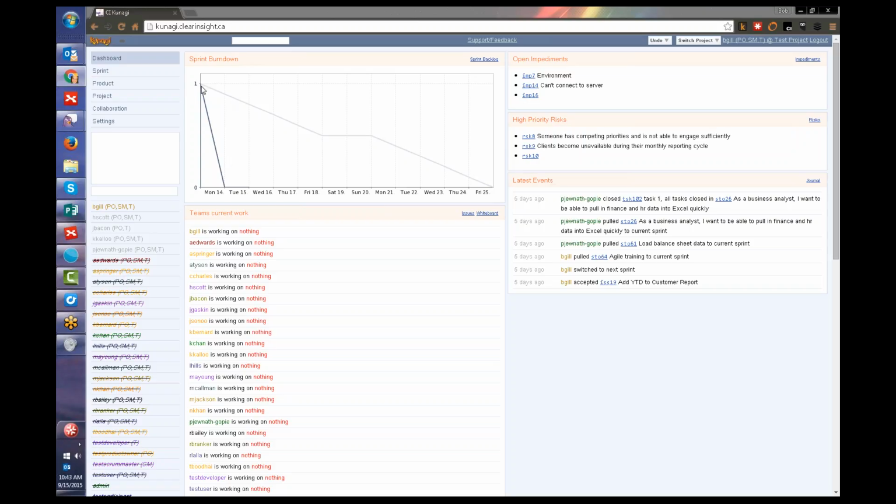If we have something that looks like this, where we had a sprint with only 1 hour of effort and it's completed the first day, that's fantastic. Probably could have committed to more, but as an example, we want this line to be below the trend line. If it's trending above, that's a signal that maybe someone's not updating something, or there's something else happening on the system that we need to be conscious of.